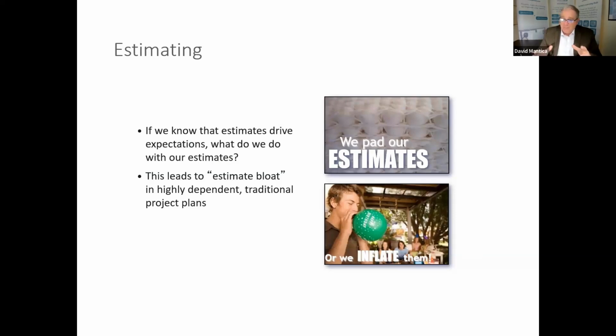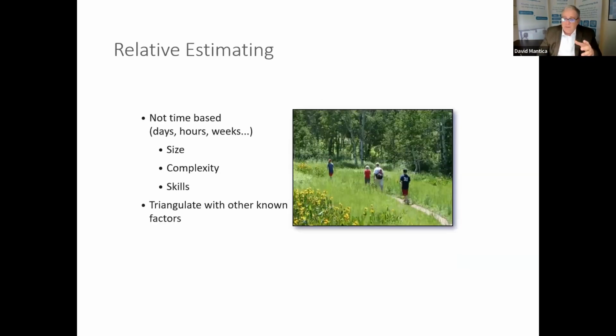You're estimating. The most important thing about estimating in Agile, it's not about time, it's about effort. Your story points are effort related, not time related. Now, ultimately, someone does transfer those things into time, but from a team perspective, what they want to learn is that in this team, we have capabilities.